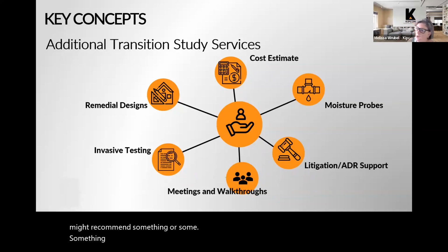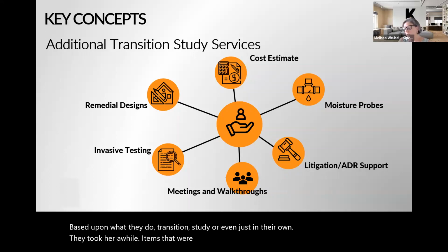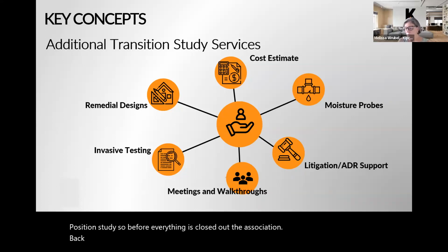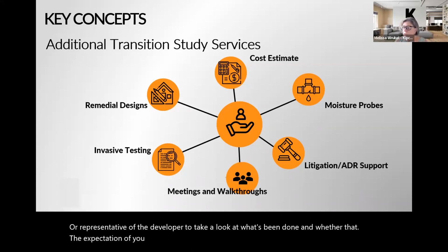Also, we do meetings and walkthroughs. So oftentimes when the developer comes back, based upon what's in the transition study or even just in their own construction completion, they may take care of a lot of the items that are identified as deficiencies in the transition study. So before everything is closed out, the association may oftentimes ask Kipcon to come back and do a walkthrough, oftentimes with the developer himself or a representative of the developer, to take a look at what's been done and whether that meets the expectation of the association or what should have been built.